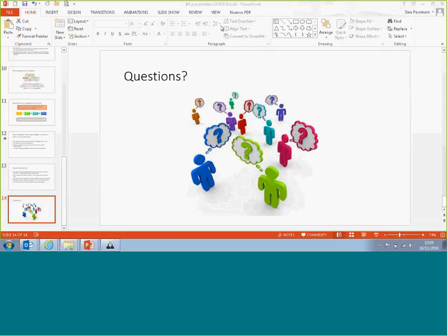So we have a project request form which will generally be completed by a program manager or a stakeholder, and that's a short document really just to lodge the project in the project register. Then we would assign a manager and/or BA to go and scope the project and understand a bit more about it.